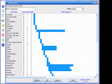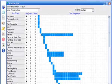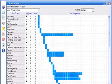The boxes in the grid allow you to indicate whether a job phase must be performed by itself, or whether it can be performed at the same time as other job phases. For example, excavation, foundation, and framing will probably only be able to be done one at a time.